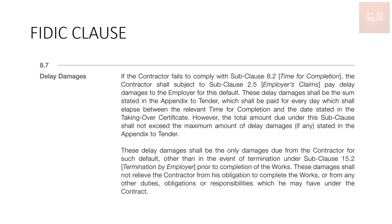As per FIDIC, the delay damages clause is 8.7. It mentions that if the contractor fails to comply with subclause 8.2 (time for completion), the contractor shall, subject to subclause 2.5 (employer's claim), pay delay damages to the employer for this default. These delay damages shall be the sum stated in the appendix to tender, paid for every day which elapses between the relevant time for completion and the date stated in the taking-over certificate. The total amount due shall not exceed the maximum amount of delay damages stated in the appendix to tender. These damages shall be the only damages due from the contractor for such default, other than in the event of termination under subclause 15.2. These damages shall not relieve the contractor from his obligations to complete the works or from any other duties, obligations, or responsibilities under the contract.